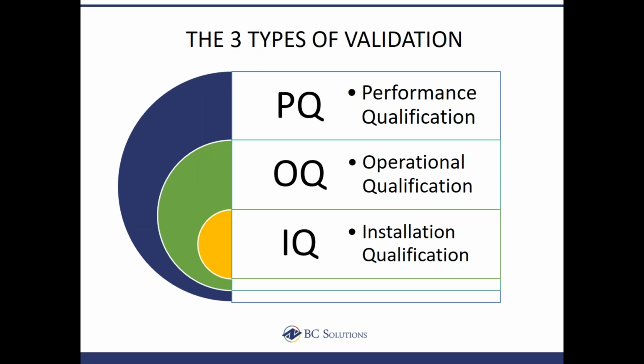Installation qualification for your hardware, your printers, your PCs, your network, your barcode readers, all other devices you use in order to use the system. You must do this. Each one builds on the other, so that's why we have IQ at the bottom. You must install, and we'll talk a little bit more about that in a minute. Install your hardware, your network, etc.